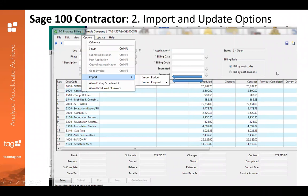Let's talk about importing and updating options available with Sage 100 Contractor. In that same Options menu, go down to Import and your two options will come up: Import Budget and Import Proposal. Proposal will give you a couple of other options, but most customers will go ahead and bring it over from the budget. It is not required that you keep everything exactly the same — you can import everything and then make your changes as you see fit. This definitely helps with automation and streamlining things.